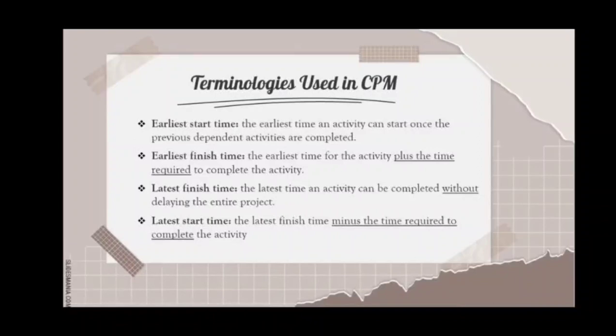Just bear in mind that latest finish time is our keyword. In the latest finish time, the word can be an activity that can be completed without delaying the entire project. The latest start time is the latest finish time minus the time required to complete the activity.